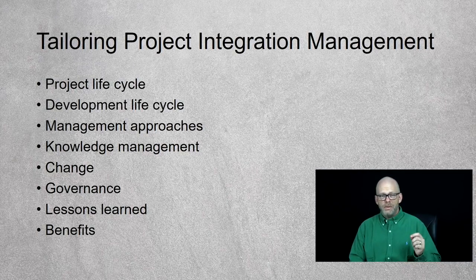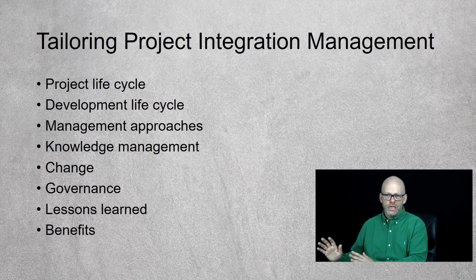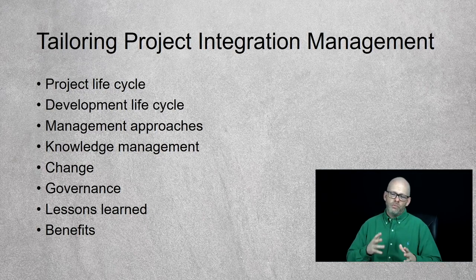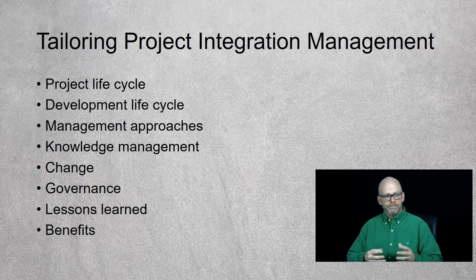Change management may be tailored. So you might have a project that's on a strict deadline, so there are no changes. This is our requirements, everyone's in agreement, and we're doing no changes. Or you might say, well, requirements are very loose, or we're in an adaptive environment, so we're going to take this approach to change management.